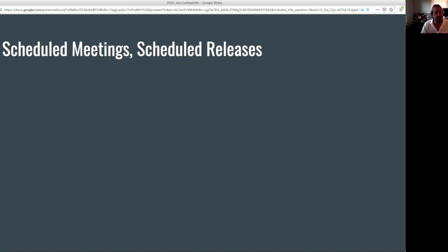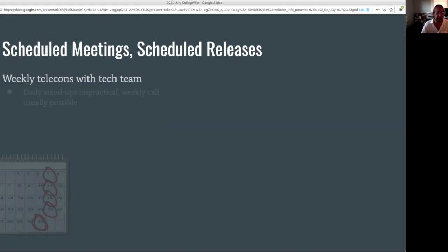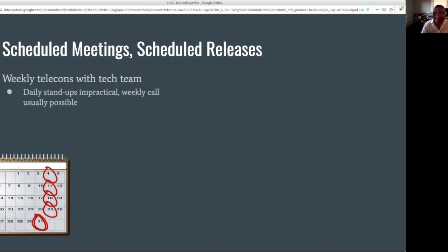The first is scheduled meetings and scheduled releases. So what we do is we have weekly telecoms with the entire development team who is actively contributing code to the project. The daily stand-ups are going to be a little bit impractical because of the way that people are split across all the different projects. It could only be like 10 or 25% of their time is for this particular project. So we have weekly stand-ups. Usually people can, that's achievable.